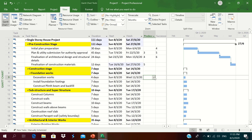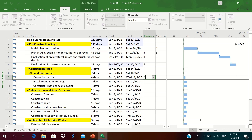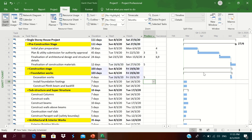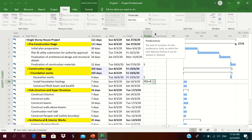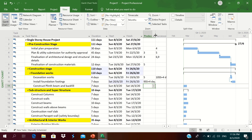Excavation works can start after finalization of architectural design and structural details — we do not need to wait for finalization of construction materials, so we add predecessor 5FS. Foundation footing installation can be concurrent with excavation: if five areas need excavation and three are already done, we can start footing installation. We set this as a Start-to-Start relationship with a +4-day lag (9SS+4 days), meaning activity 10 starts four days after activity 9 starts. This Start-to-Start relationship is visible in the chart.